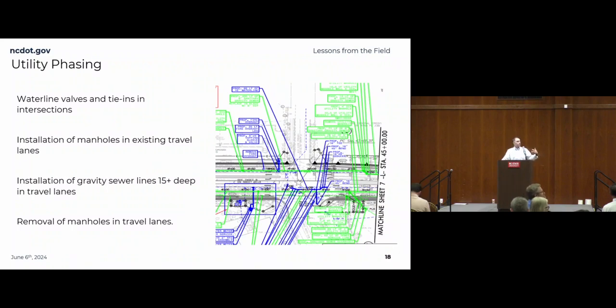How long can we get it done? We really don't want to lay 100 feet. Again, this is sort of an exception here, but 100, 200, 300 feet parallel, that's a long time to be in a traffic pattern if you're shifting away from it, as well as taking depths into account. If you're in the middle of one lane, you're going to have to pose into the second or adjacent lane, maybe for a traffic shift, for shoring operations.